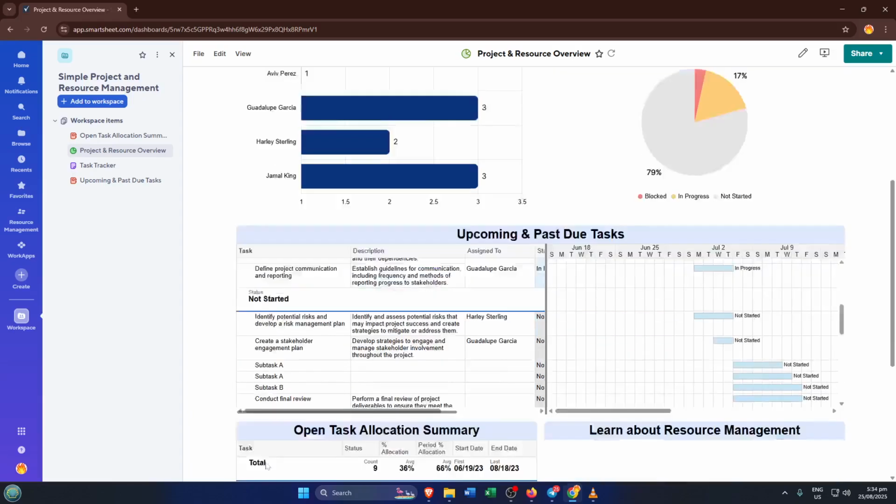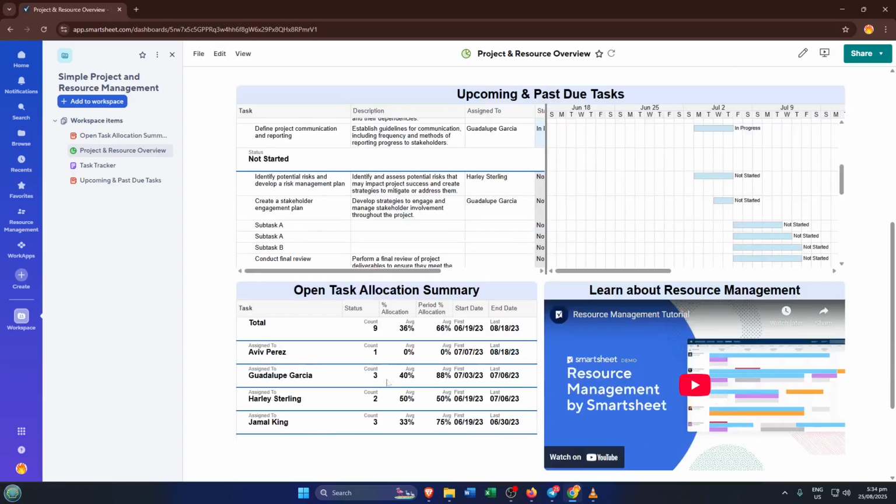Another cool thing is how these fields can be referenced in formulas inside the same sheet. So for instance, if your budget field lives in the summary, you can pull that number into calculations elsewhere to figure out things like total cost overrun or remaining funds, and it all stays automatically updated as the data changes.